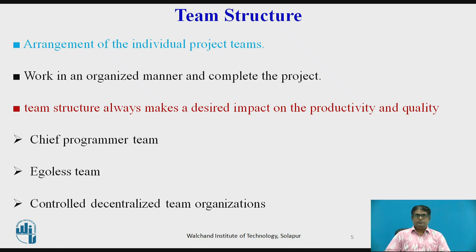The structure of the working team during the development process is very important. Team structure means the arrangement of individual project teams. The project team must be arranged so that they work in an organized manner and complete the project as a unit. The team structure always makes a desired impact on productivity and quality. Based on the type and complexity of the project, the project manager organizes the team differently. There are basically three formal team structures: chief programmer team, ego-less team, and controlled decentralized team.